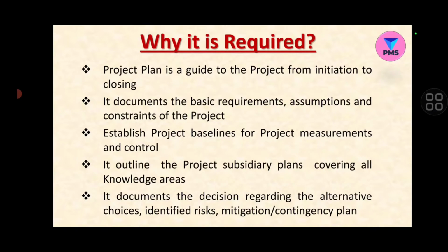It establishes project baselines, as I told you, for project measurements and control, because that is essential. Against the baseline you are going to compare your project progress, and the variances will come, which will tell you the health of your project, how well you are doing, or what your progress is.